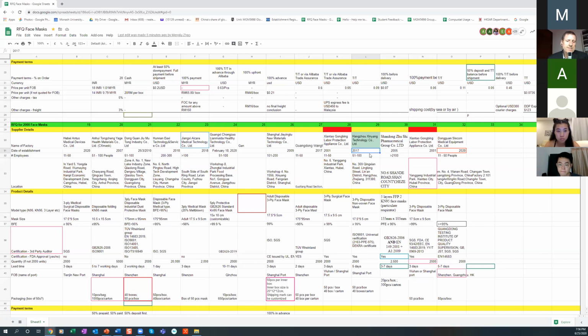Okay. Number 3, and this is more a minimum, it's not a comparison. It's not for you to compare which factory has better certification. It's either they are certified or they are not. There's no such thing as a factory that is 70% certified. It's either they have it or they don't. It's a yes, no. You with me? So you don't want to say, oh, this supplier seems to be more certified than the other one. Well, you've got to be clear about the certification. How many of you thought certification is very important? And we're going to have a look at that in a minute.